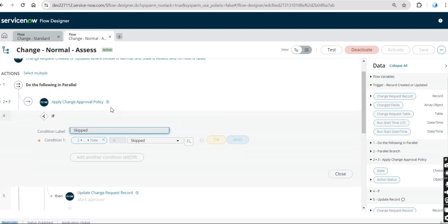When we get the change approval, that means when transforming the SS state, say SS to authorized, we get one approval, generally from the assignee's manager or the assignment group. Only when we get that approval are we able to move to the next state, which is the authorized state.